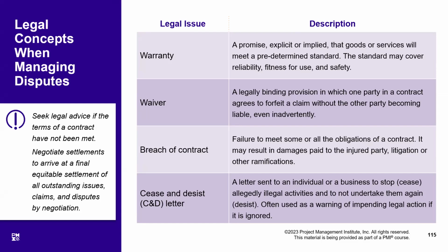Waiver. Waiver is a concept where you were the contractor and I was the buyer. The understanding between us was that you would deliver certain items today, which you could not. Maybe you had some problems. I am trying to accommodate you, and I agree that you had a problem, although you were supposed to deliver by today, and I realize that I can waive off my right to the claim.